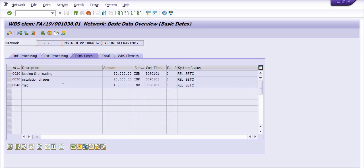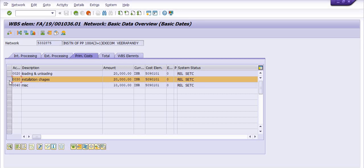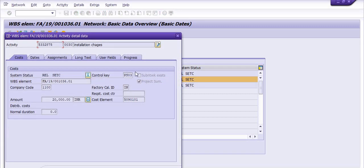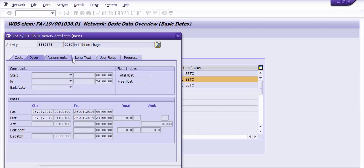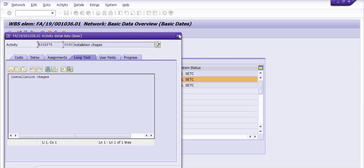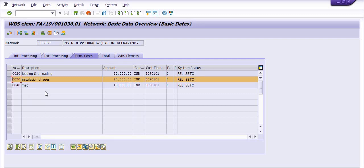There are two options: you can create a direct purchase order for these services using account assignment P (project) for DHS services with account assignment N and D; or once you release the external processing or prime cost, a background purchase requisition will be generated and used to create the purchase order. For example, clicking on installation charges to display: you can see the WBS element, the amount, and the account assignment.